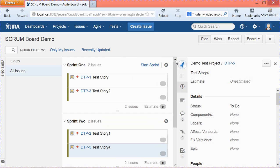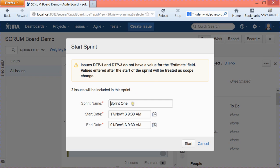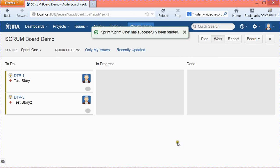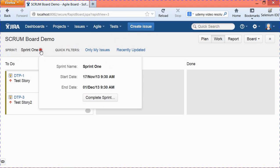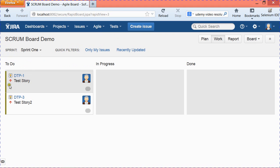After adding issues to a sprint, you can start the sprint by clicking the Start Sprint link. It will prompt you with the sprint name, duration, start date, and end date, which are pre-populated. You can adjust the dates based on your sprint cycle — usually two to four weeks. Once configured, hit Start. The active sprint will appear in the drop-down, and you'll see Sprint 1 is running with two user stories in the To-Do column.